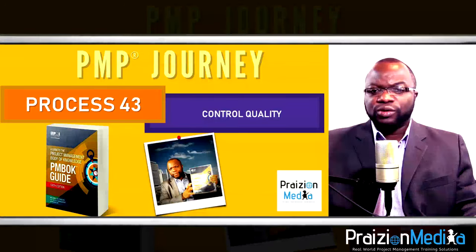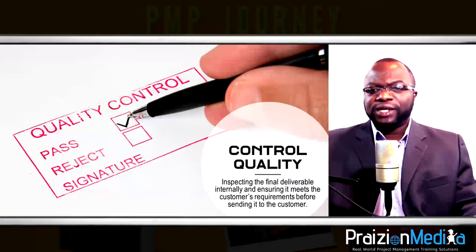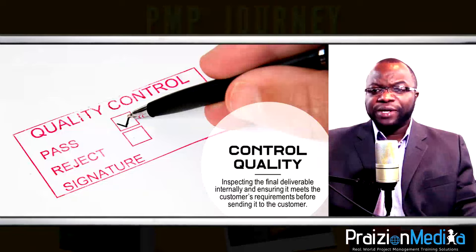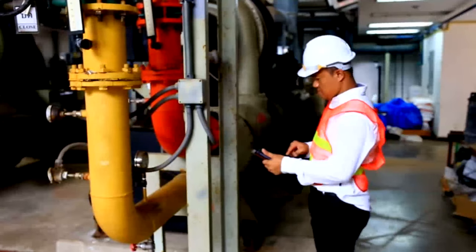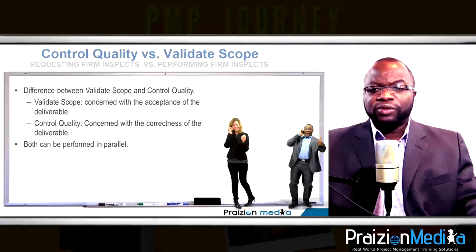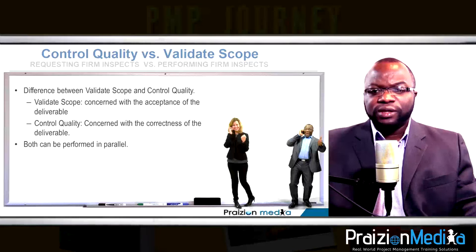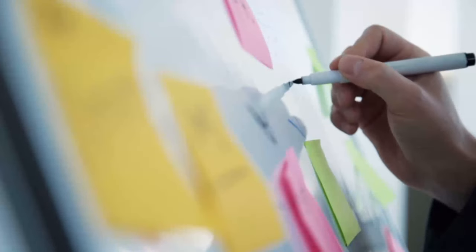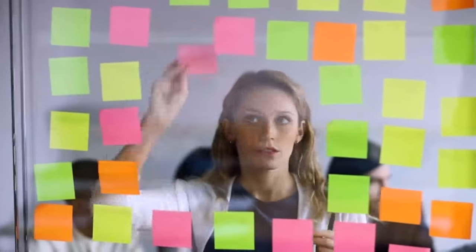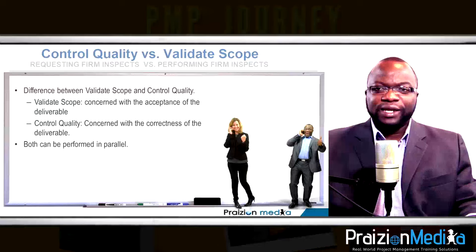Process 43: Control quality. The project manager and team ensure that the deliverable produced is fit for use and conforms to requirements through inspection. The PM must check every way possible that the deliverable is good to go to the customer. Note that validate scope (customer checks) and control quality (internal check) can actually be done in tandem — in parallel in incremental chunks — especially considering the agile approach discussed in the PMBOK Guide.